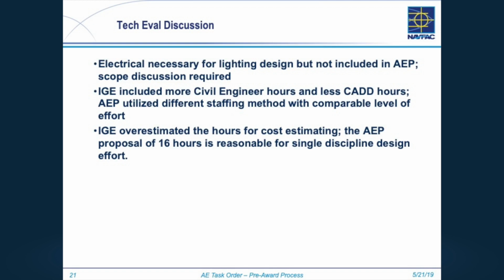And so, I can't remember the whole thing, but I think it came back with, well, we really think our civil engineer that does utilities can do the electrical piece of this because there's nothing extending. And we said, yeah, Joseph is shaking his head. So, we said, no, we would feel a lot more comfortable if there's an electrical engineer doing this part. So you're going to find things like that.